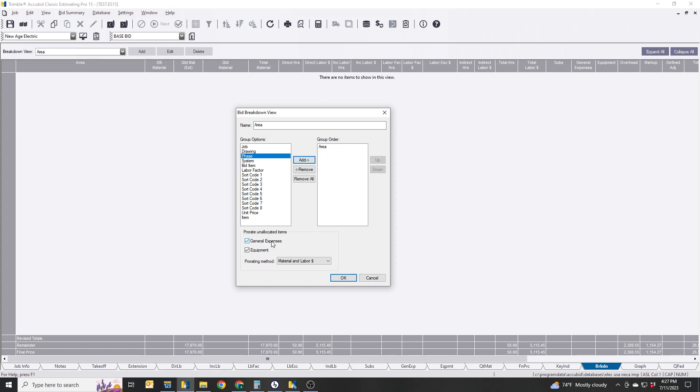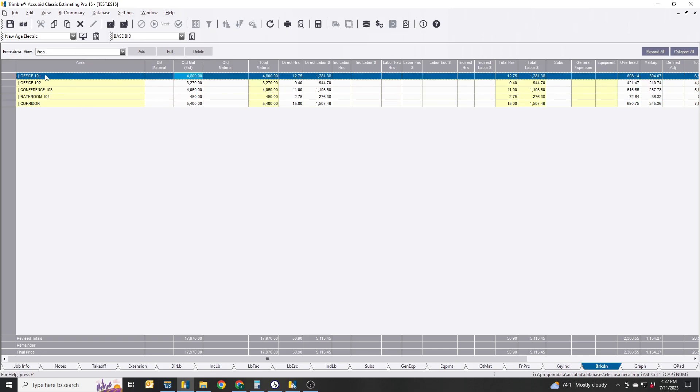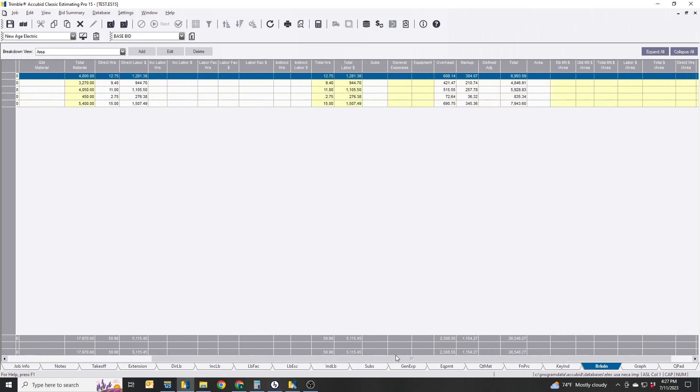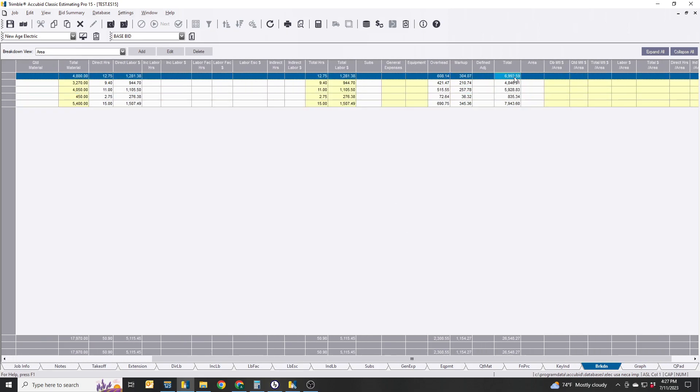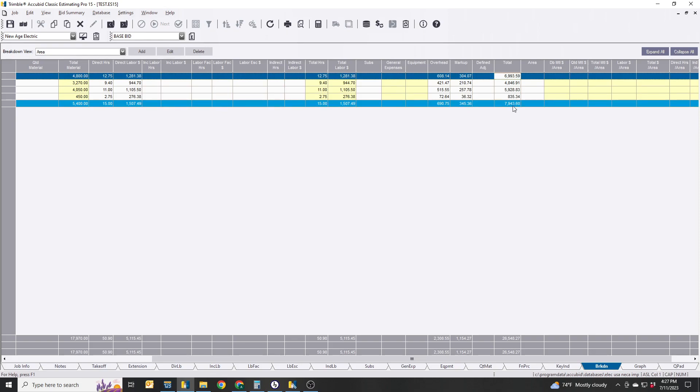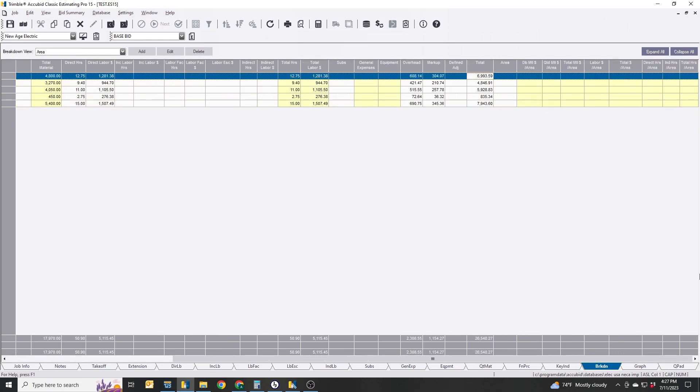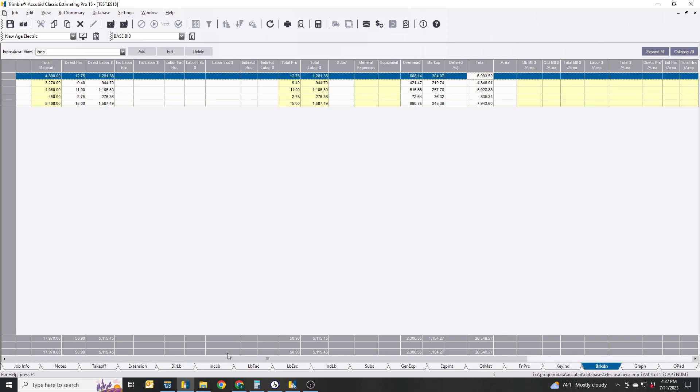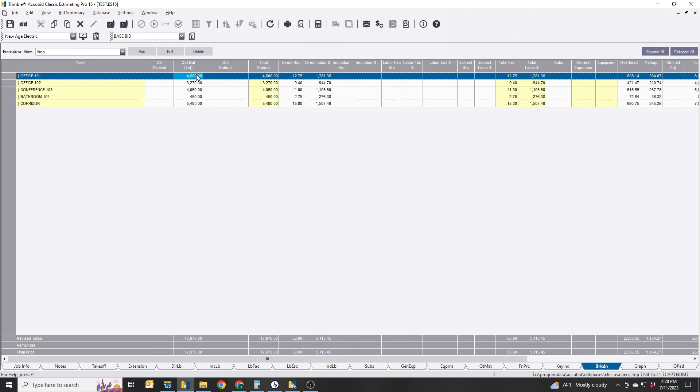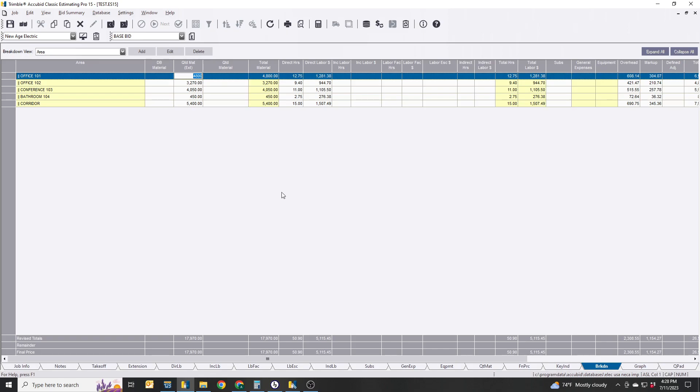Now what you're going to see is all five of the areas. Swing all the way over and you're going to see the total cost for each area. So owner says what's the cost of Office 101? $6,959. What's the total cost of the fixtures for that area? Should be $4,800. Quote material? Correct. So that's your database material and your quoted material. So these are your fixtures right here, $4,800 for the fixtures there.